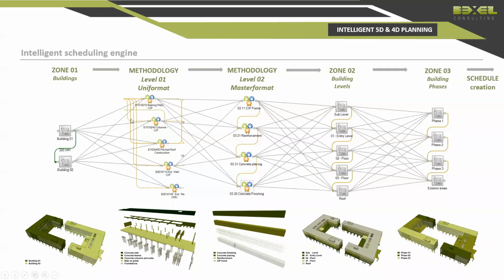When you create your methodology, when you create your items, and then add a zone, or mix methodology with zones, you're automatically telling the system to segregate these tasks into multiple levels according to the zones. And what it means in this case, if we had, for example, these 5 cost items for the tasks, adding these 5 zone levels, automatically we're going to have 25 tasks in the schedule created by the engine.